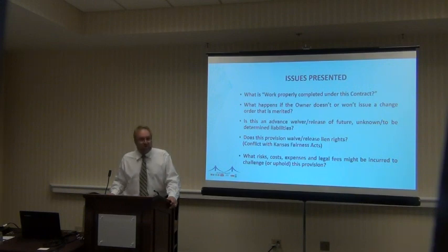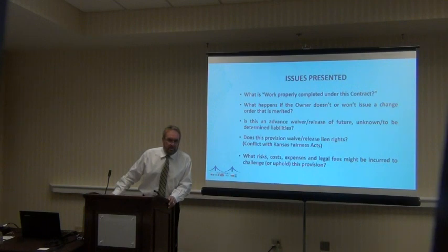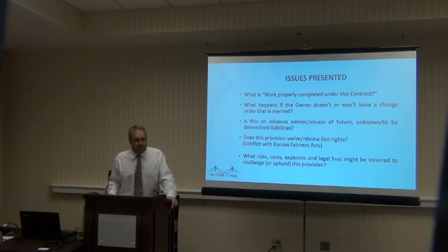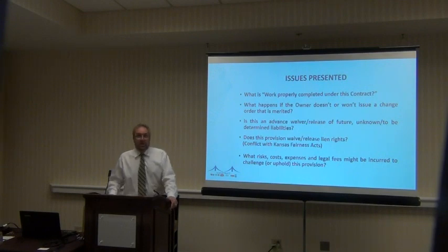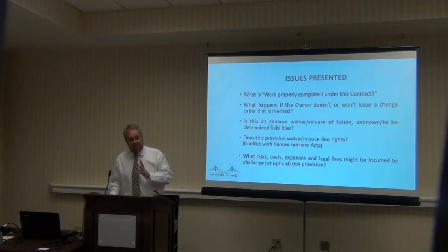What about if the work is changed either actually or constructively, and the owner says, I ain't giving you a change order for that. But you did the work anyway, okay? Legally, I tell you the law does not favor releases in advance of a claim coming into being or being created. In other words, it's difficult for me to release something that I don't even know exists yet.